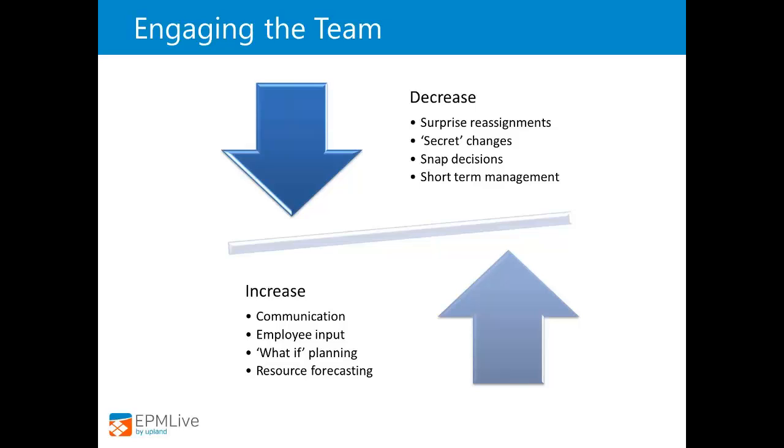That ties into the concept of needs-based recruitment planning. If we know that we're going to start a project in Q3 that needs a skill set that we don't have enough of in the organization, we need to back that up to sometime towards the beginning of Q2 to start recruiting those people, because it's going to take a while to find qualified candidates, it's going to take a while to go through the hiring process and then the onboarding process, and it's going to take a while for those people to actually get up to speed with our organization and be able to contribute.